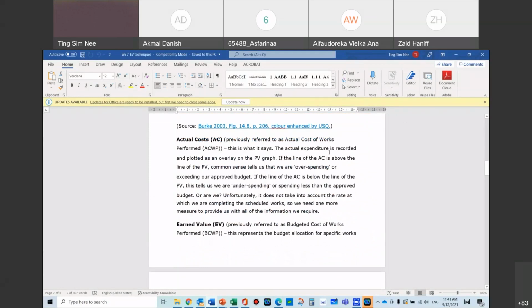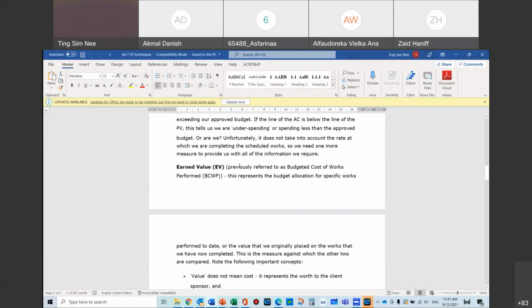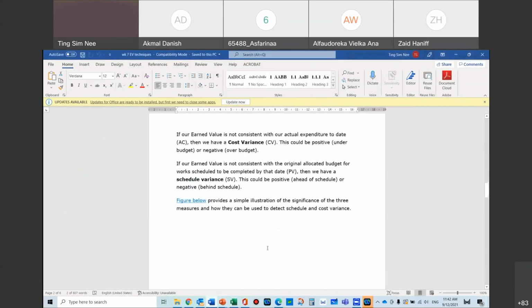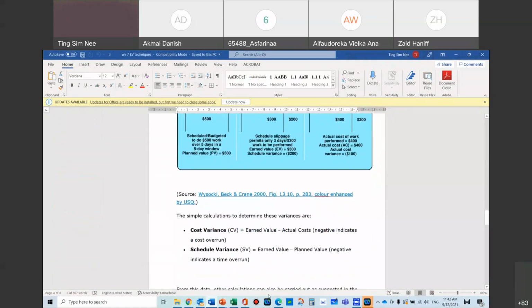This is budgeted cost, BCWS, PV. AC is the actual cost, meaning that amount, we need to give you the actual expenditure. And then EV is the budgeted cost of work performed, meaning the work done, how many percent, you go back to the budget, you times it, and you get that percentage. You get those numbers based on that budgeted cost of work performed. Okay, so with that performance, you will use this formula to do the calculation.